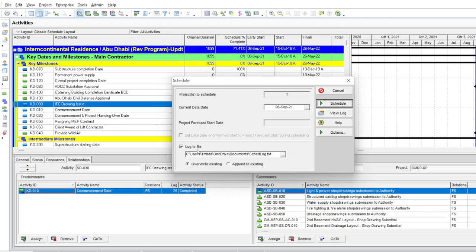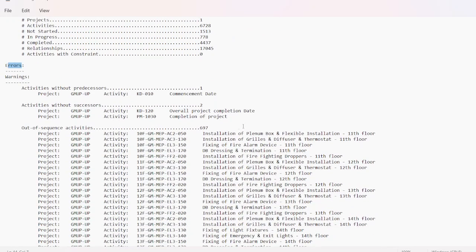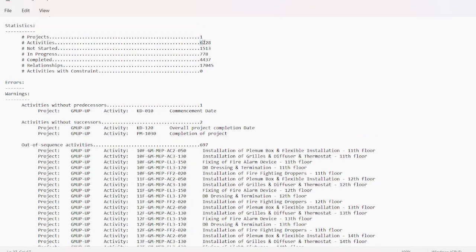Press F9 again and then you can view the log. Before selecting View Log, make sure you check the log file so that the schedule calculations are already saved. When we open the View Log it gives you the scheduling report. You can see in the errors that there are out-of-sequence activities — 697 of them. Our program contains 6,700 activities and around 697 of those are out-of-sequence.